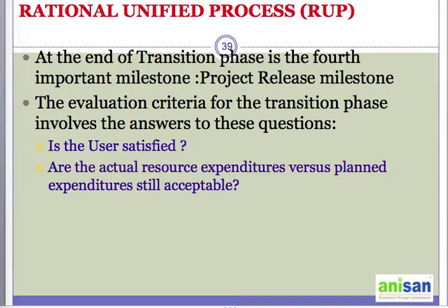The reason is that the solution, when it is built and tested, is in a secluded environment, but when it goes into the production environment, it starts interacting with the users as well as with other systems, with the real-time databases. So the newly built system will go through various scenarios which may not have been captured or tested. At that time you may come across some issues and bugs breaking down the system. Those have to be captured and fixed immediately, so that the system becomes stable in the user community.